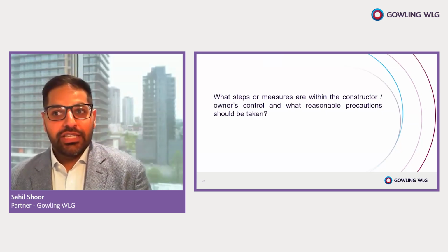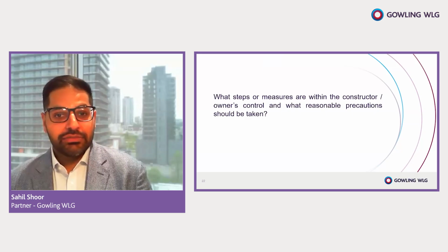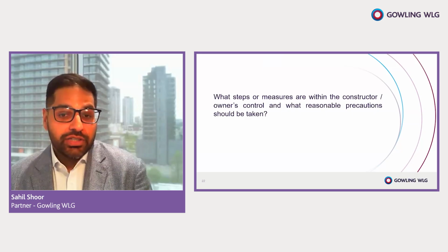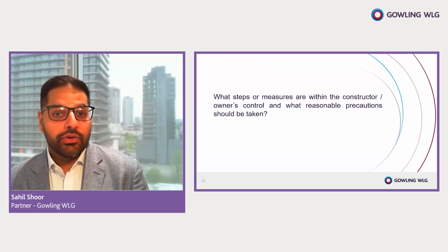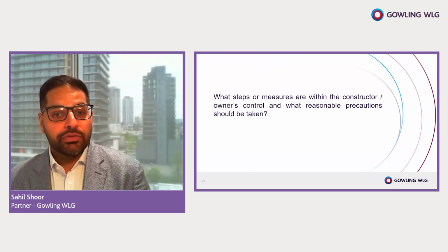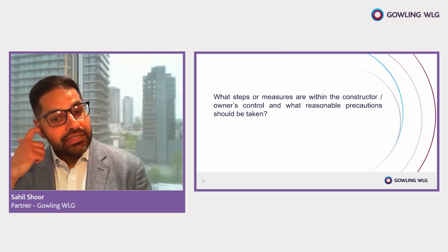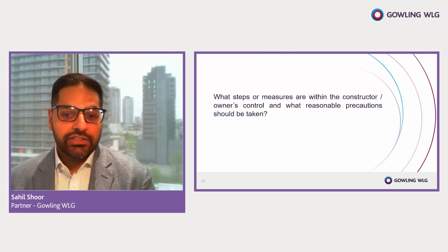And there could also be mechanisms built in, as you may think something is going to work, but it may not actually work. And whether or not health and safety is an ongoing discussion, it should be at either a weekly meeting or a project bi-weekly meeting, whatever the case may be, so that the plan is getting updated and revised with the issues and circumstances as they arise.